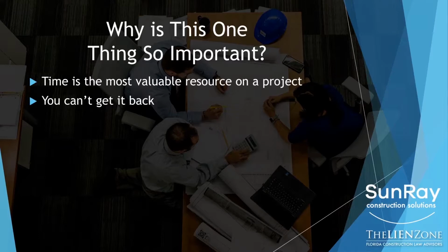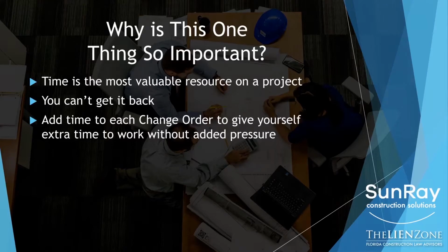At the same time, you've signed a contract probably that requires you to do some things within a certain amount of time. So you have either a specific amount of time to do something or a specific end date in which to complete things. That date is not moving, so you need to move it, and the way you do that is by adding time in your change order. The reason it's so important to do it in the course of changes that may not otherwise need time is that it allows you to bank some time without the added pressure of the job already being late.